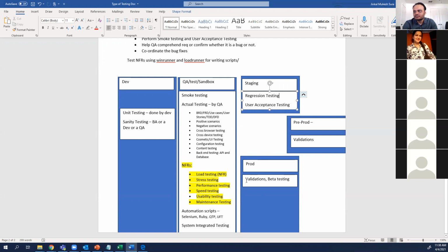Okay, just a question that comes to my mind. Thank you for clarifying that. Let's say we've run 9 stories and everything's working fine, and we put the 10th in, and now it's not working fine. We test that one story and it's fine, but when we add it to the 9 stories and integrate them, it doesn't work. So how do you fix that bug? It's not on you, right? All you are saying is that this is the bug that is failing. The developer will look into that, try to find out why it is failing, and fix it. Once they fix it, the sad part is that you have to test all the 9 stories again.